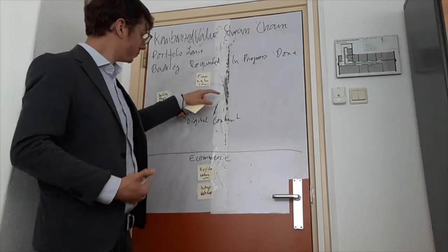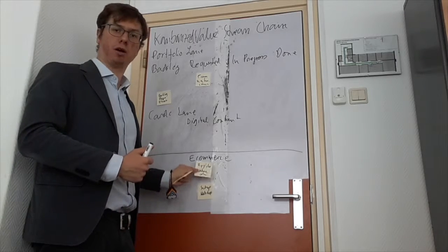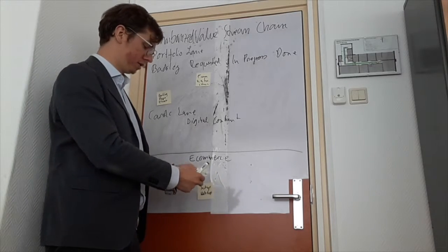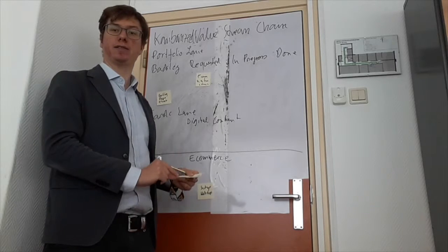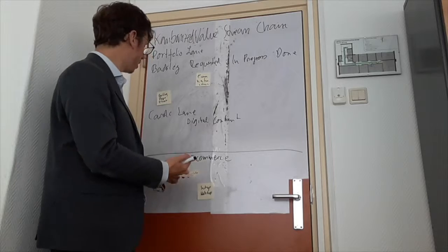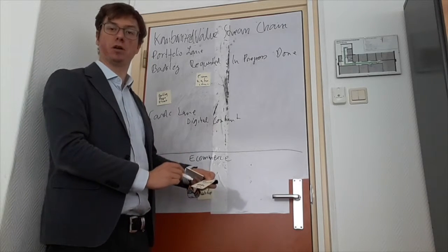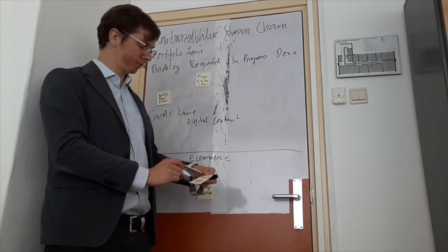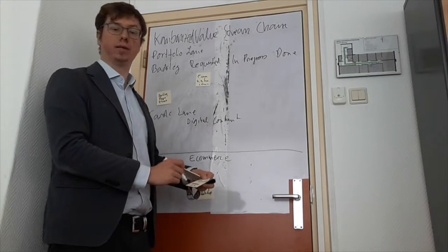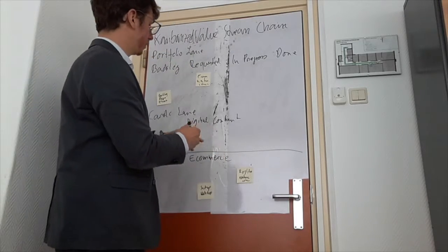So for example, when someone is starting with this task, register the domain nature.com, we assign this sticky note or ticket or Kanban card. Yeah, we say Kanban card is the best. We assign this Kanban card to the developer who is working on the shop, and we put this into the progress column.